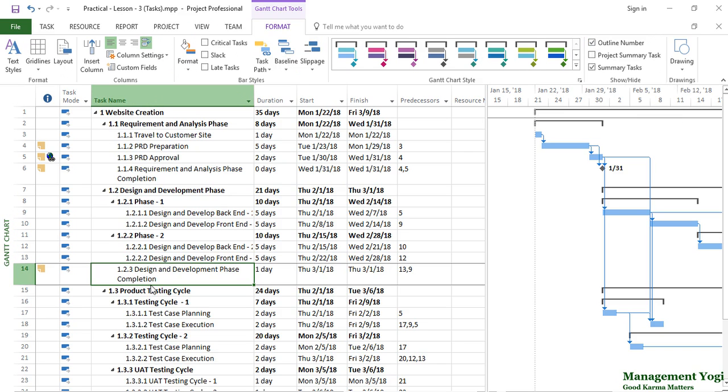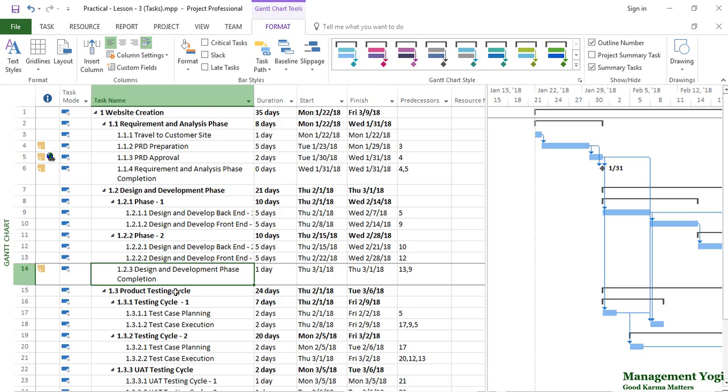So website creation is 1. Under that it is 1.1 requirement analysis phase, 1.2 design and development phase, 1.3. Then under 1.1 you have 1.1.1, 1.1.2. Under 1.3 you have 1.3.1, 1.3.1.1. Every element is uniquely identified by this WBS ID or WBS code.